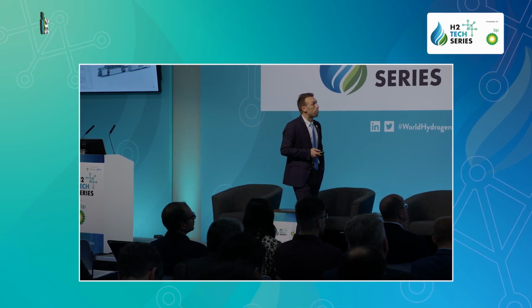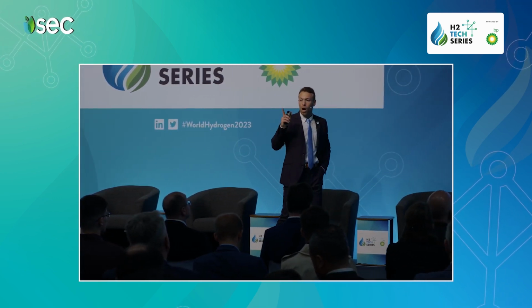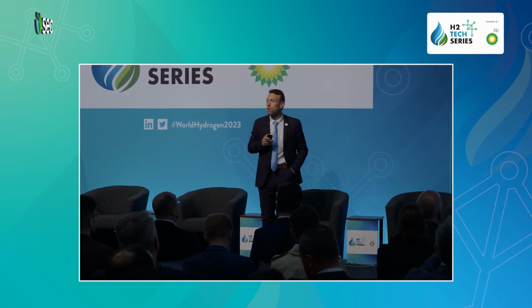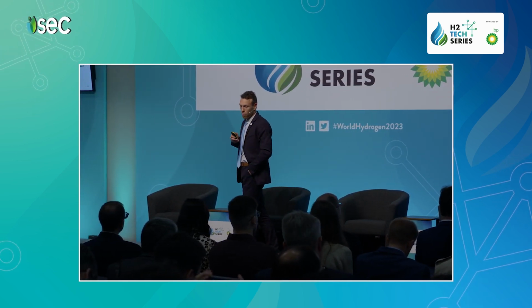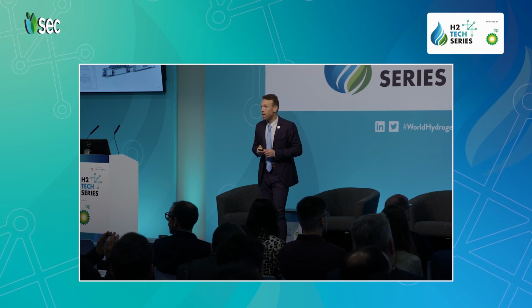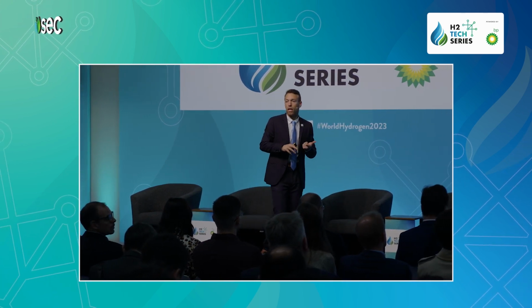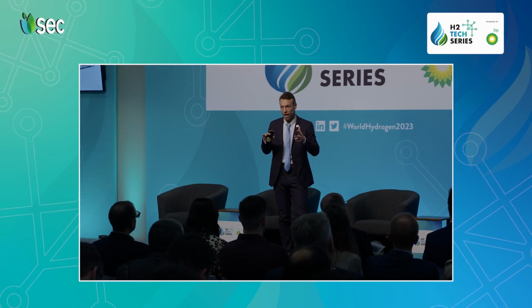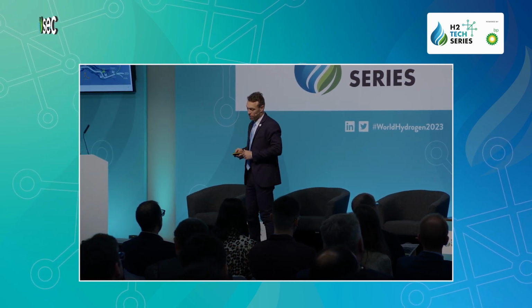We have been awarded a major project in Portugal. We are in a BDP and feed phase where Plug Power is awarded for 100 megawatts in a petrochemical plant, and we are also supplying the complete hydrogen purification unit. So why we have been awarded for this project? Because we were the only one to deliver in such a fast fashion, but we also have a very high understanding on how typical oil and gas players are working and developing projects. So it was a very exciting development. We worked together with an EPC, with the end customer, to deliver a complete basic engineering design package before the FID, to de-risk the project at the maximum, and then to gain speed during the complete development of the project.